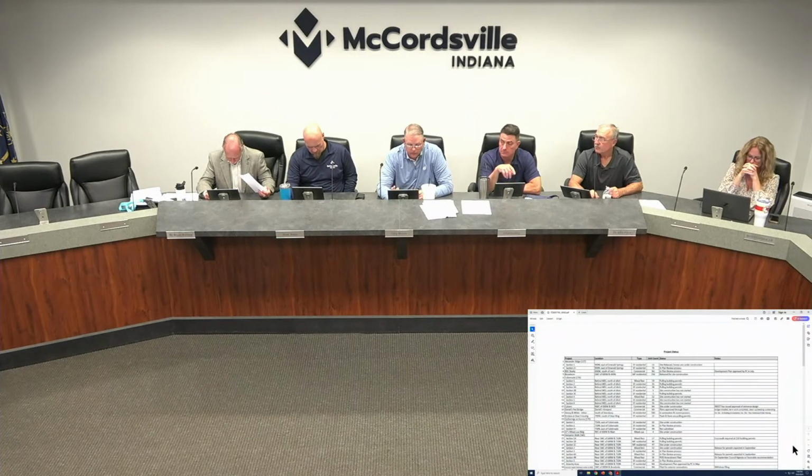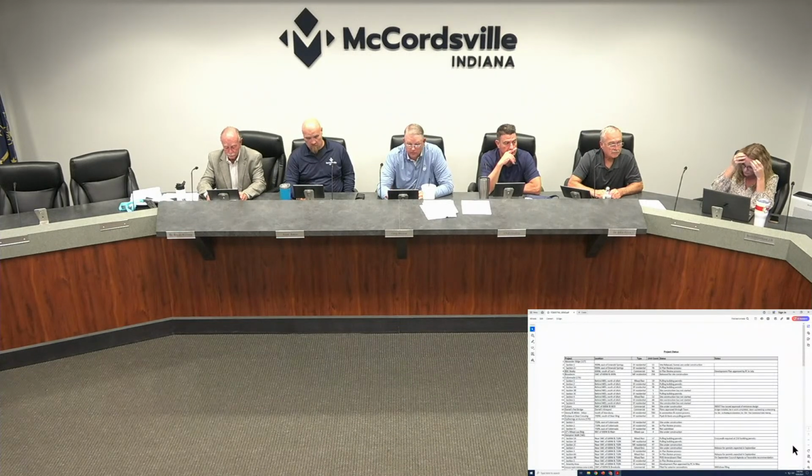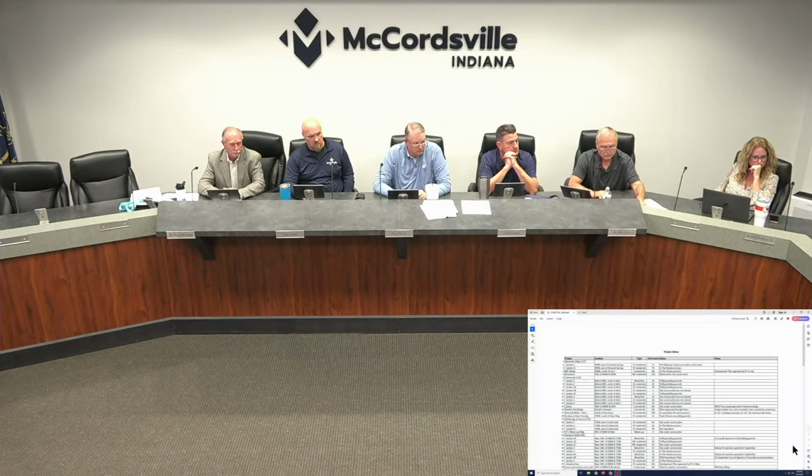Ryan, will you give just a real quick update on the roundabout at 600? Yeah, so the bonds closed on Friday, I believe. Late Friday. Right now, you're seeing a little bit of work at that southwest corner. That is related to their on-site infrastructure. We expect at this point in time that they probably will delay any meaningful work on the roundabout until the spring. You may see some utility relocating or some clearing associated with the roundabout this fall and over winter. But being mid-October, there's not a lot of point in starting that roundabout until next spring when we've got the weather on our side.